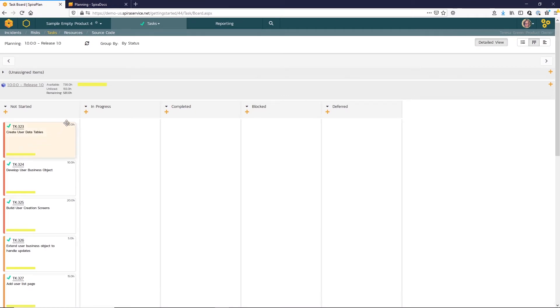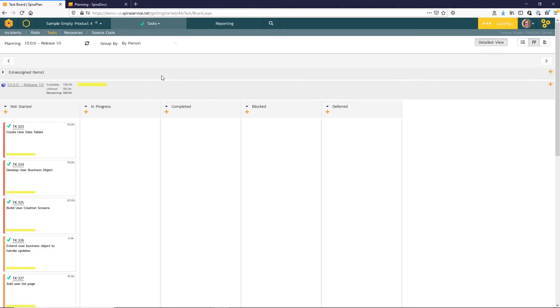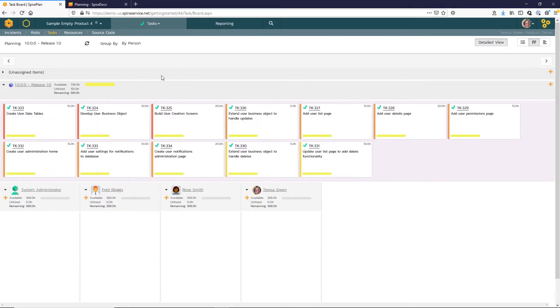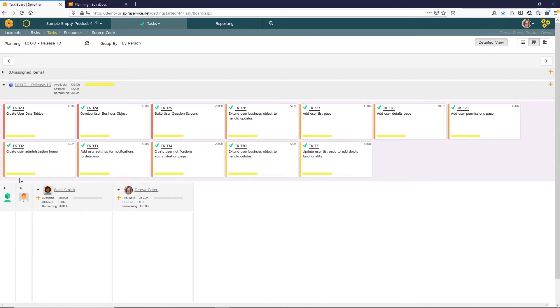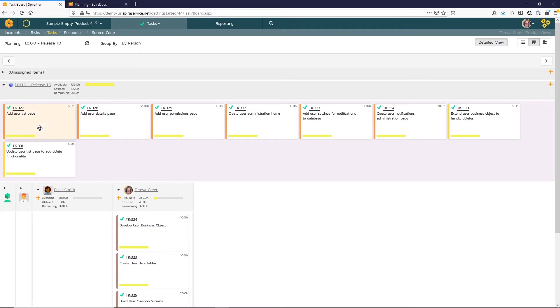To begin making assignments, we just want to change the group by to by person. Spira will display all the members of the product. You can easily minimize those that aren't applicable. Now to make task assignments, you simply click on cards and drag them to the appropriate resource.